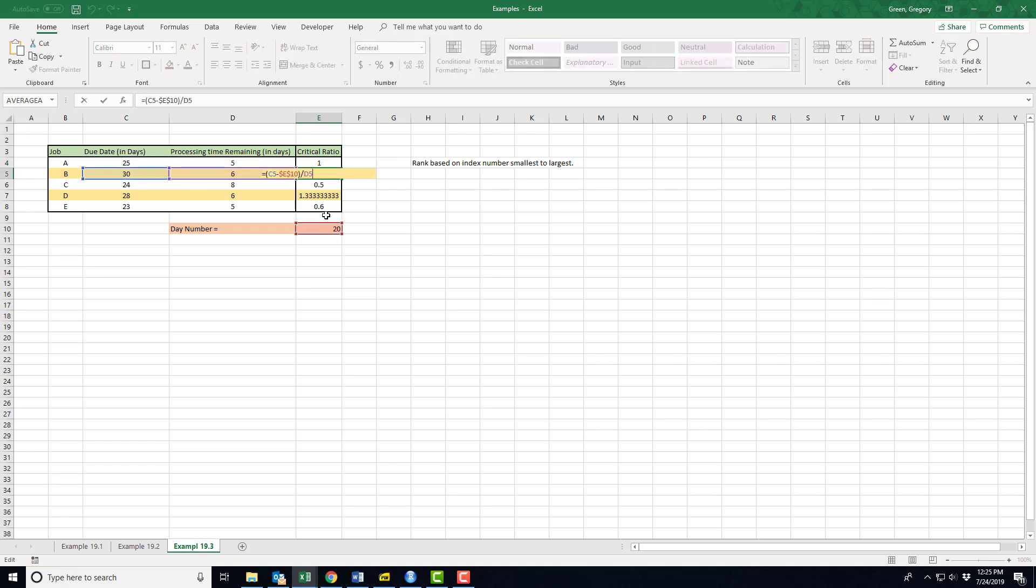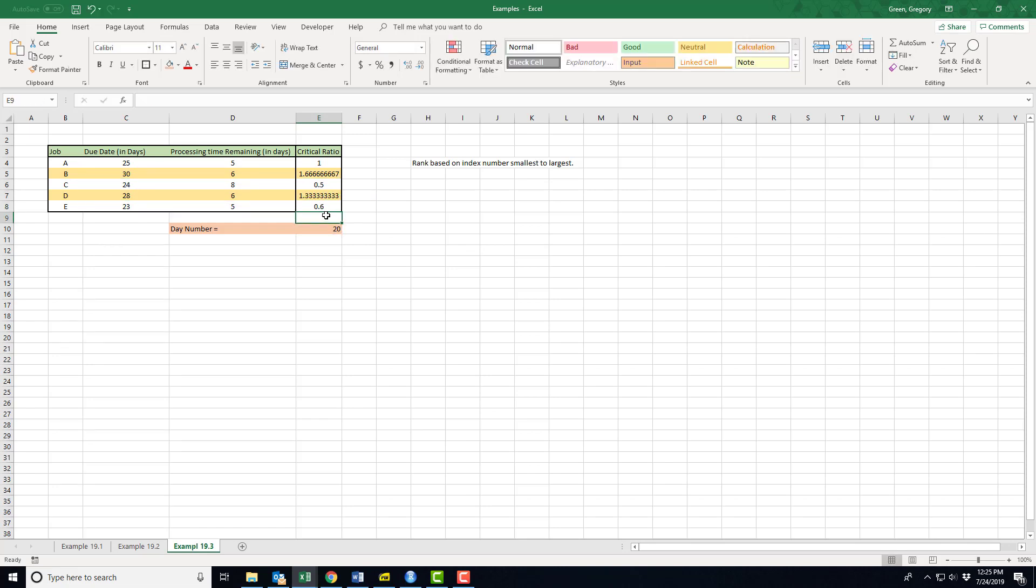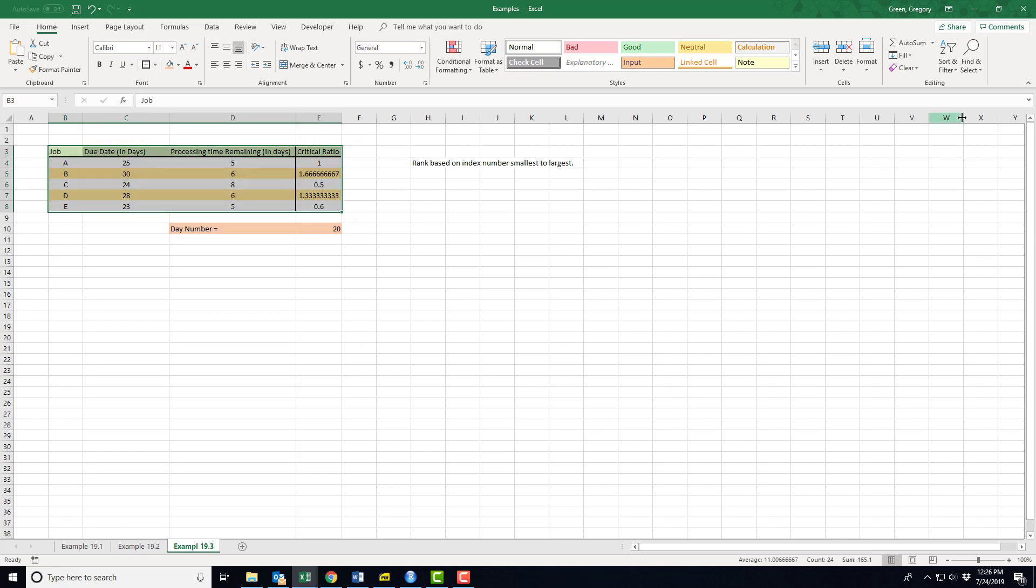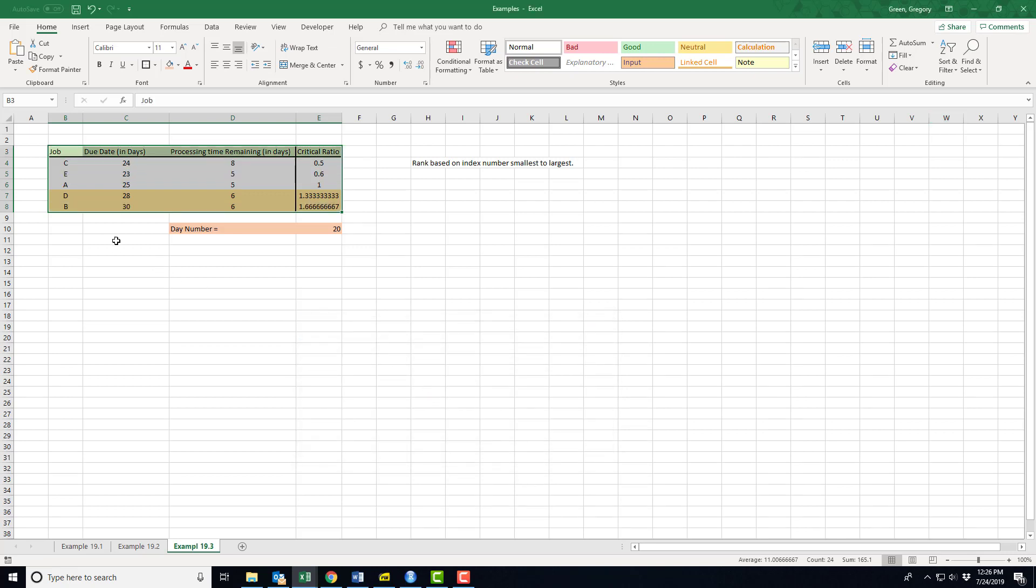So I just take this index number calculation and I just copied it down the line getting the meanings. Well, the greater than one meaning is ahead of schedule, less than one means it's behind schedule. How do I organize? Well I want to organize this by smallest critical ratio. I'm going to filter it custom and sort by critical ratio smallest to largest.